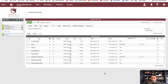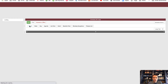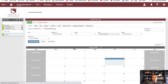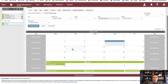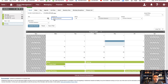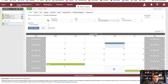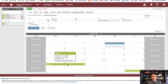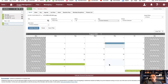Why is assigning items so important? I use this for resource planning. If you have a team and multiple projects going on, you can take the month view and say 'what is Viv up to during the month of August?' You can filter the entire view to show items assigned to Viv. If I click Viv and click update results, you'll see where Viv is allocated. When we have multiple projects we can see exactly where she is — demoing at 34 Long, doing carpentry at a different project — and apply those filters.